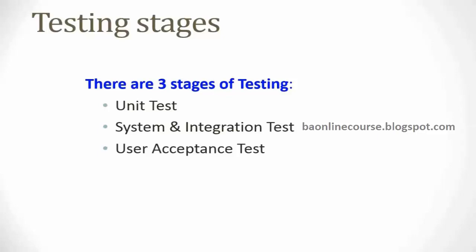So you need to first create a detailed plan of how you are going to execute the testing, and then you have to prepare the test cases, right? So you first prepare the test cases and then you would execute them. So it's not like you can just start the testing right away, because you'll not be sure whether you're testing all aspects of the system or not. So a detailed plan needs to be prepared, and then the detailed test cases need to be prepared, and only then would you actually start executing the testing, right? So that's the steps involved in testing.